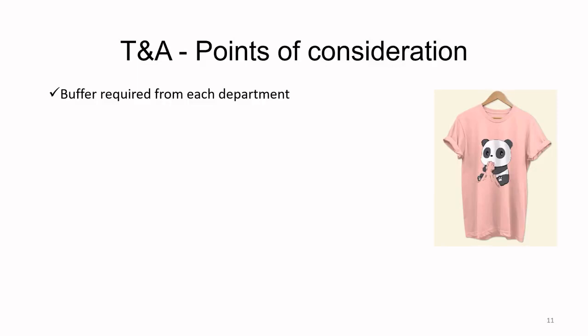For production, you will keep a buffer of at least 2 to 3 days. Same for finishing, washing, packing. So buffer is required from each department. Accordingly, the time and action calendar should be made slightly relaxed, not very tight.